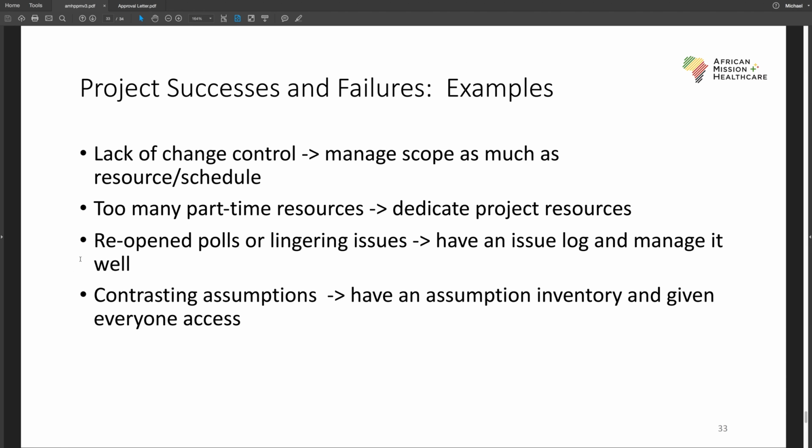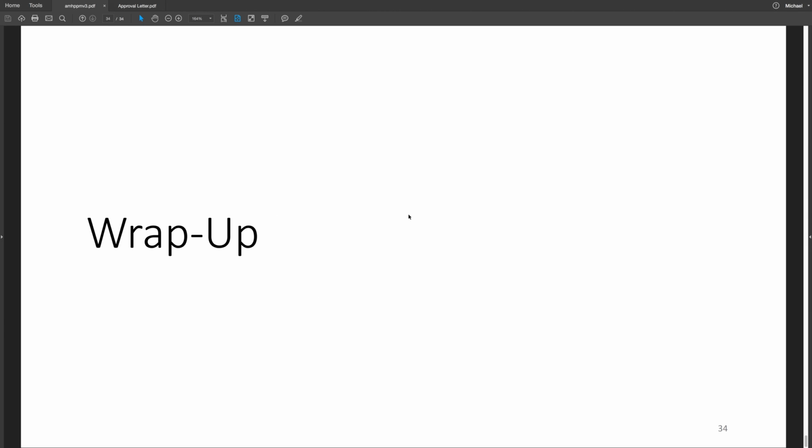So some people on the project are thinking, hey, we're going to start doing surgeries March 1st. And other people think, well, March 1st, we're going to start scheduling surgeries, and maybe we'll have some emergency surgeries, but scheduled surgeries won't happen for some time after that date. A simple miscommunication, but different assumptions can have big impacts, and I think that's a good case example of how that could occur. Well, this is time to wrap up.